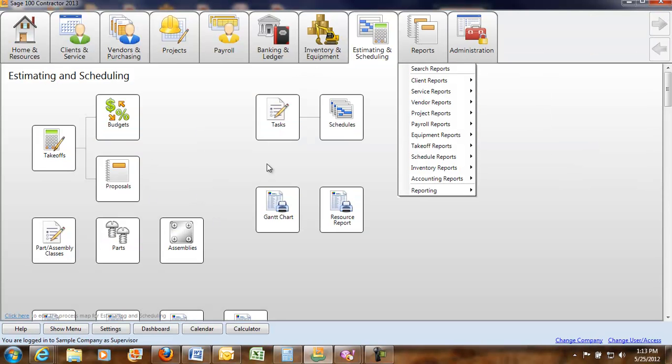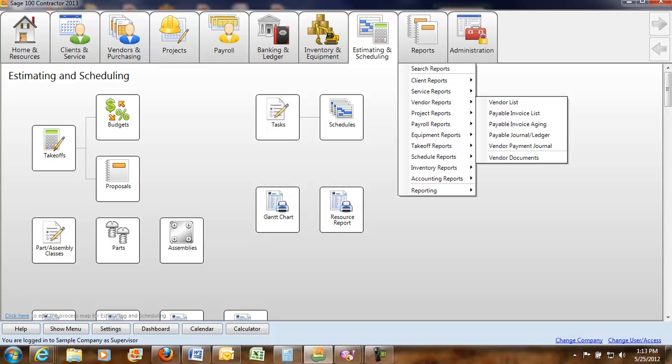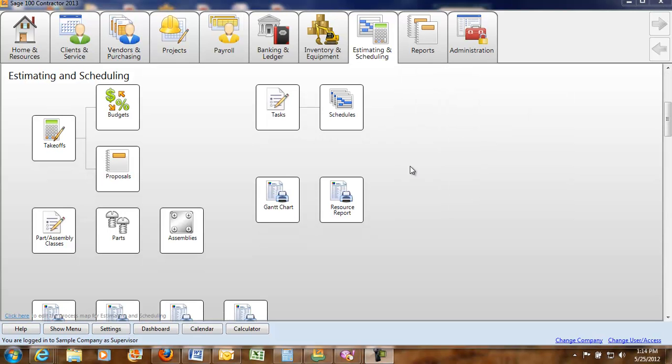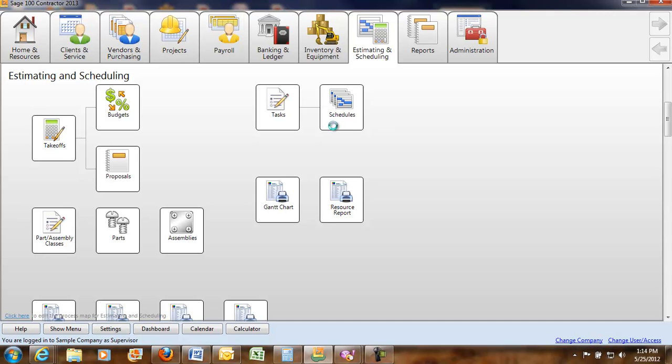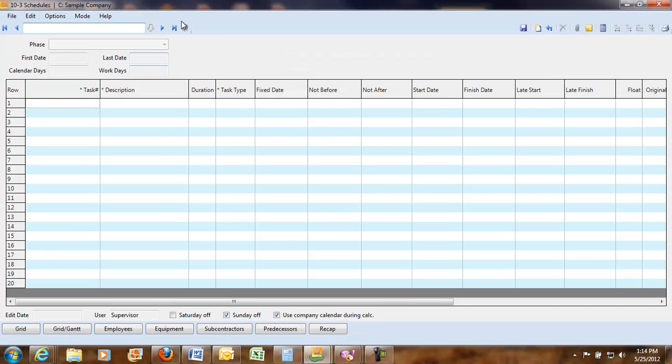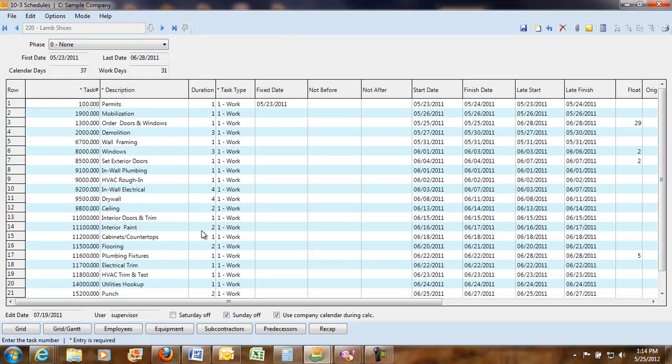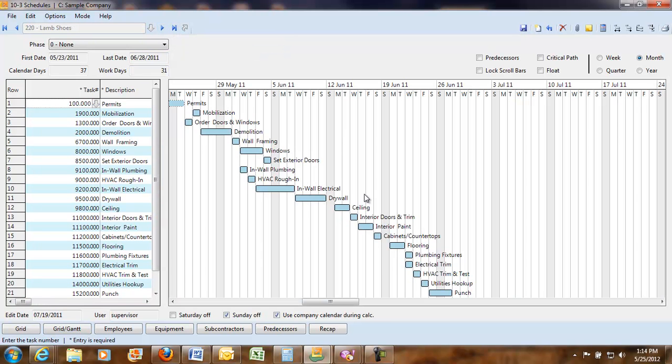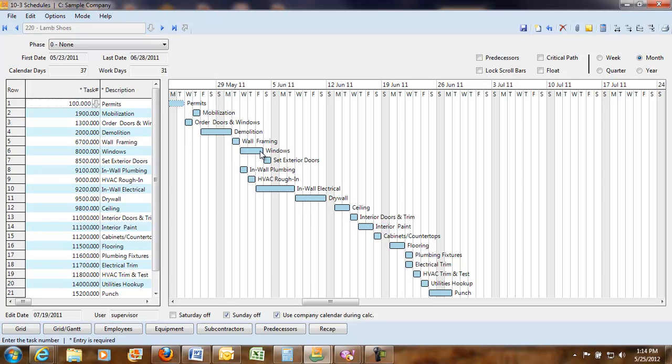Now also within the estimating and scheduling you can do your schedules. You can get your grid and Gantt charts. You can make changes to it. If something's going to have an effect on something else it will make the change completely to it and it'll push out whatever it's going to have if it's a critical path item.